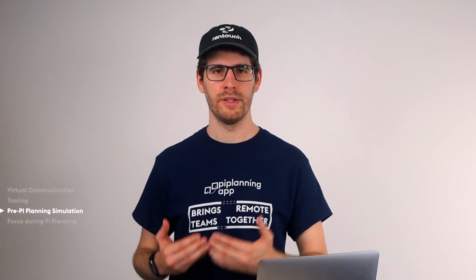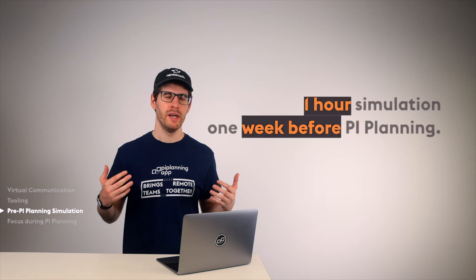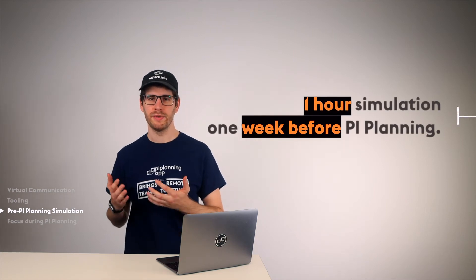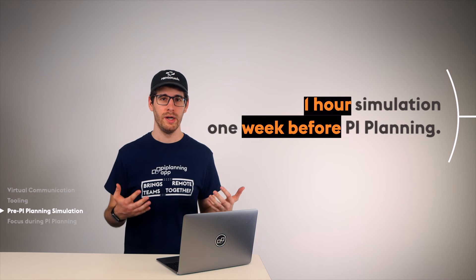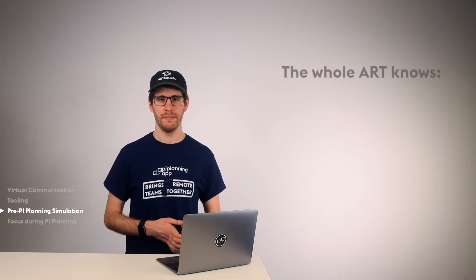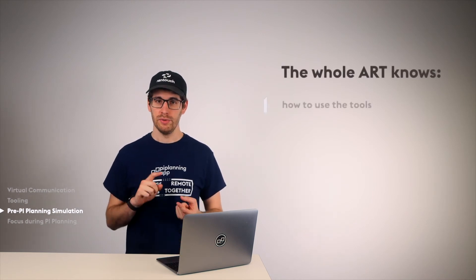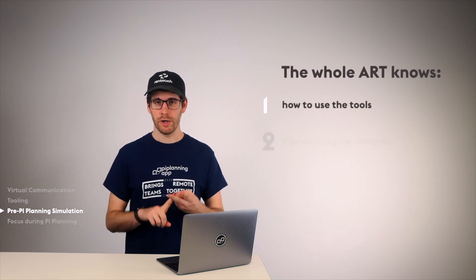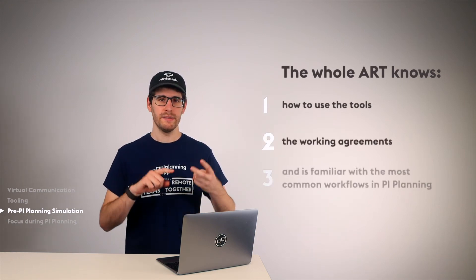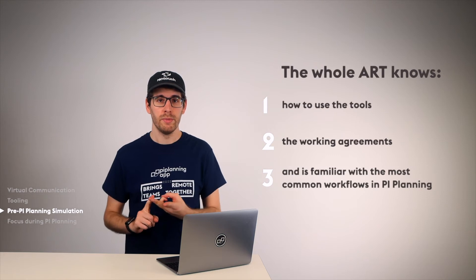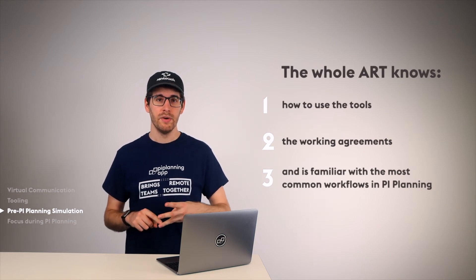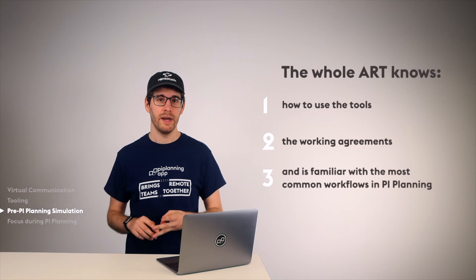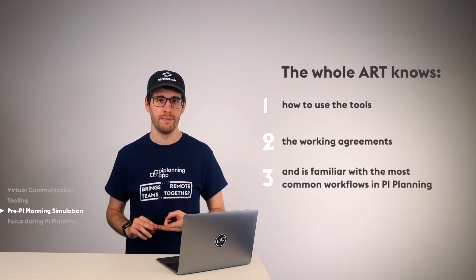An integral part which basically decides on the success or failure of remote PI Planning is whether to take the time to run a simulation. It's about doing a one-hour simulation session with the participants, one week before the real PI Planning takes place. The goal is that all ART members know what they will have to expect from PI Planning. So, they know how to use the tools, which working agreements exist, and they learn the most common procedures of PI Planning and see what happens differently than in co-located PI Planning.